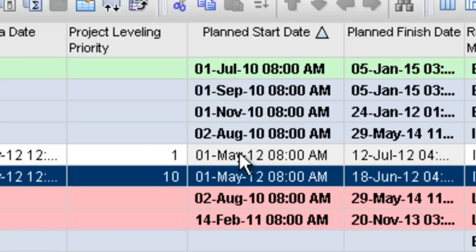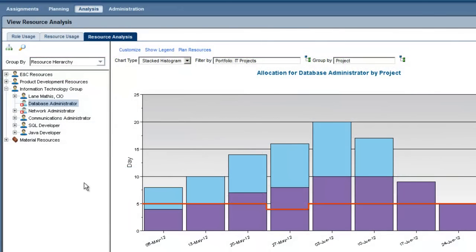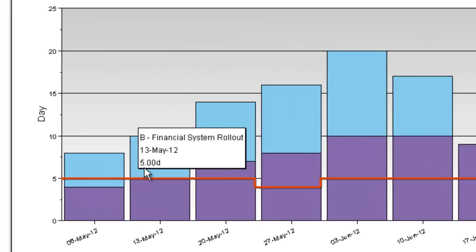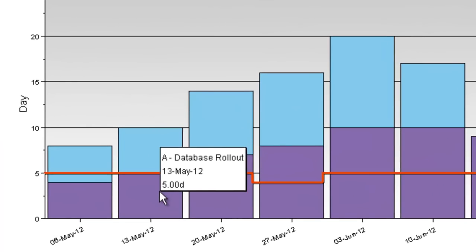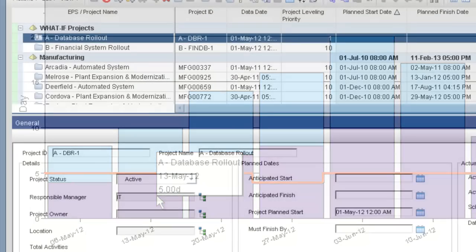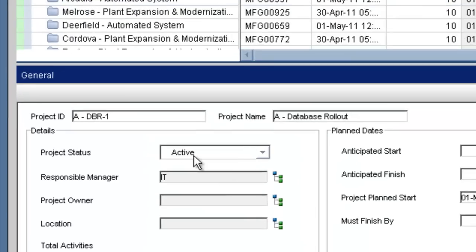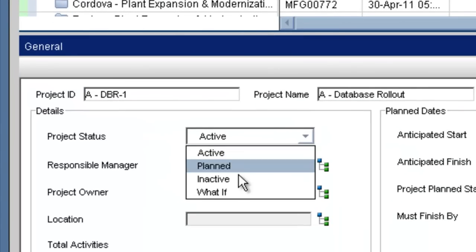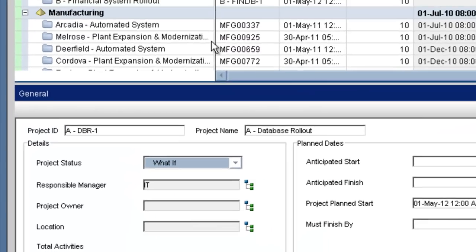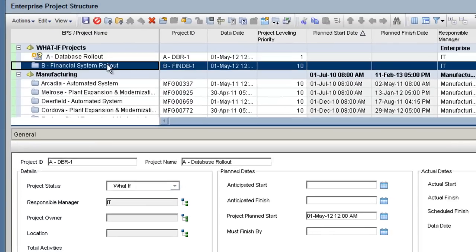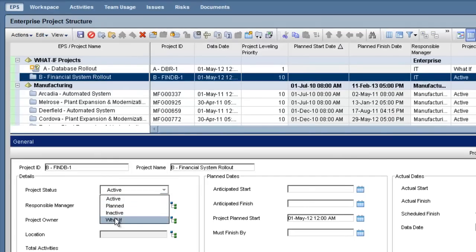The problem is both projects are bidding for the same scarce resources at the same time. By running what-if scenarios based upon the priority of the project and the activities within that project, we can learn the earliest dates on which these projects can finish.